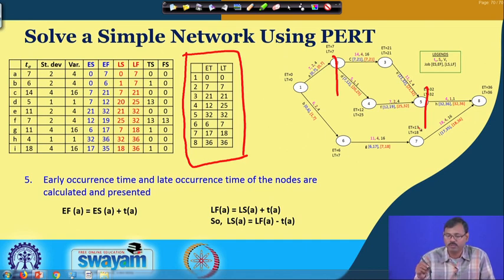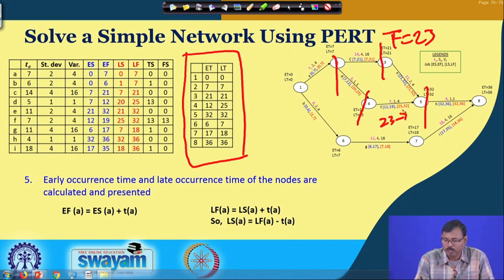So, in those cases, if they find while observing these two that this one, instead of 21, the arrival time becomes 23, it is on time. They have reached, then if they start this job at 23, they can still complete it by 30. So what the manager will do is deploy some of this manpower and resources to this, so that they can expedite this job to be completed by 32, and that can be completed beforehand of that one.